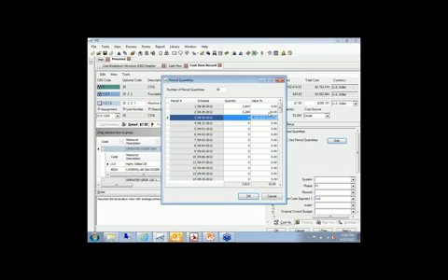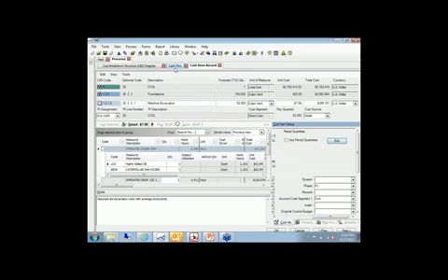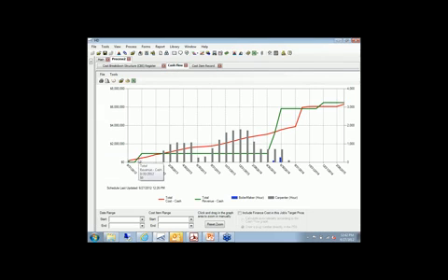But for the high dollar things, the large quantity things, the old 80% rule, the things that are driving 80% of the value of the project, you might want to get more granular in terms of how we think that work's going to go. And therefore, that will impact the cash flow that we're looking at. So if we spread an item equally, you're going to see a linear curve on it. If we ramp it up, you'll see a more accelerated curve, like we see over here on the far right.